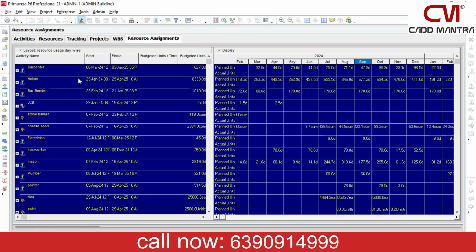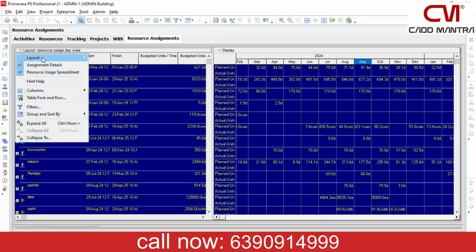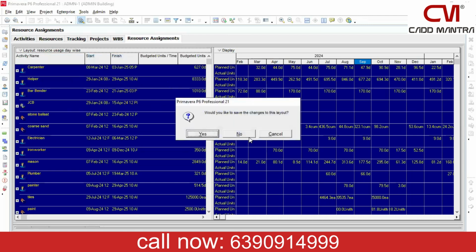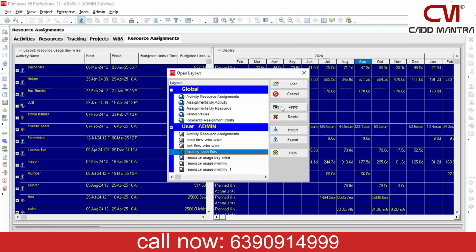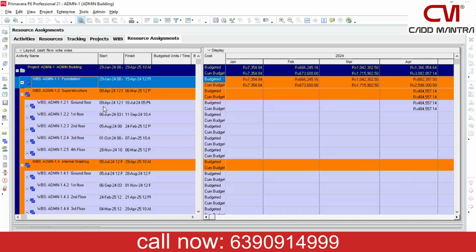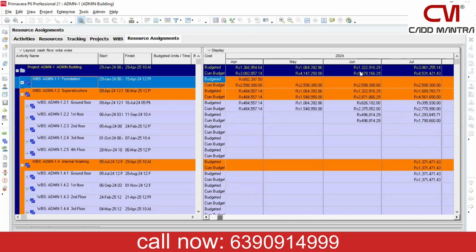Manpower, equipment, machineries. It is even going to help us to see the cash flow in Excel format. So that is how we can easily have our cash flow for this project. So this is our requirement for each month. And this is the cumulative cost we would be requiring month on month, right? And where we are spending that, we can also get easily, on what work packages we are spending.